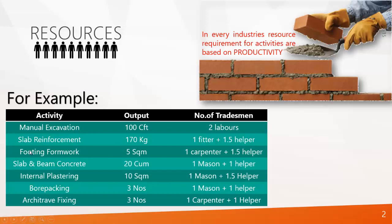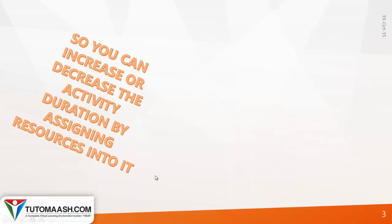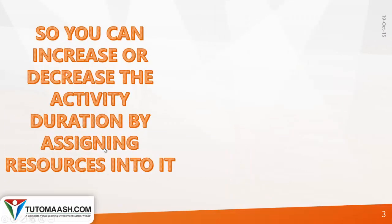And to do a 5 square meter formwork activity, you require 1 carpenter and 1.5 helpers. This kind of productivity can be arrived at based on the tradesman output. You can increase or decrease the activity duration by assigning resources into it.